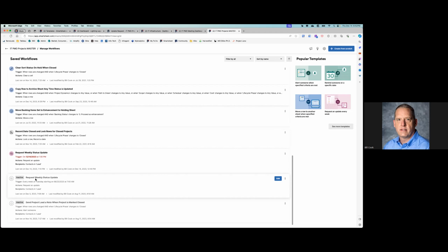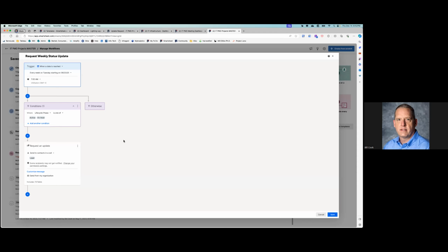So this here is the weekly status update. They're all very simple, quite frankly. This one runs on a date every week on Tuesday, starting back in August of 2020 at 7 a.m., for projects that are active or on hold. So ignore new projects, ignore backlog projects, ignore closed projects, obviously. Send to the project lead